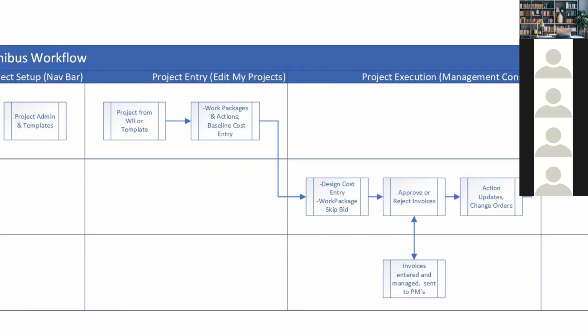One thing is they would do an order of magnitude cost for a project. I think that's called project budget in there. And so that would be Ian or Joe, thumb in the air, maybe talking to you guys and gathering some input information or other ancillary financial information they have. But they'd come up and say, oh, this project is about $10,000. Okay, that'd be a